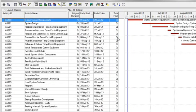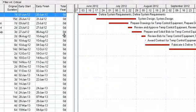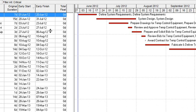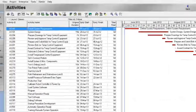You will see that only the activities that are critical in the project appear. You can verify this by looking at the Total Float column in the activities window and seeing that all the float values are zero. You can also verify this by looking at the bars in the Gantt chart and seeing that they are all red. This layout enables you to focus on activities that have the most impact to the schedule.